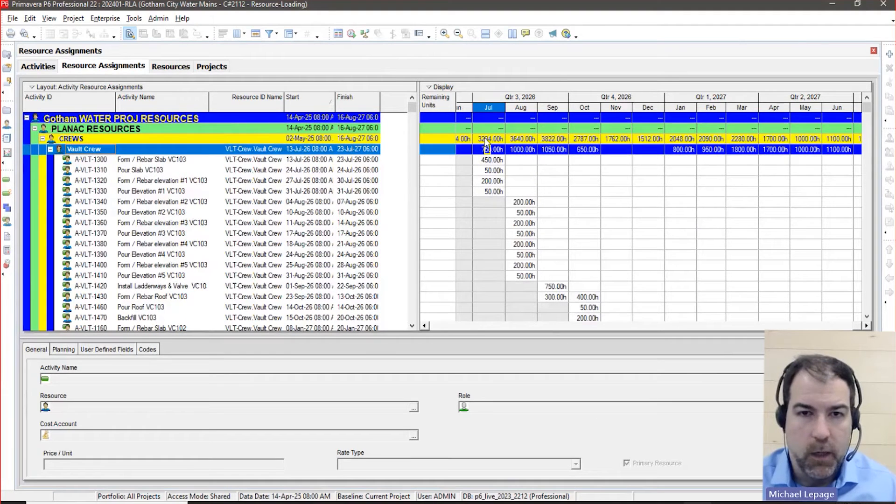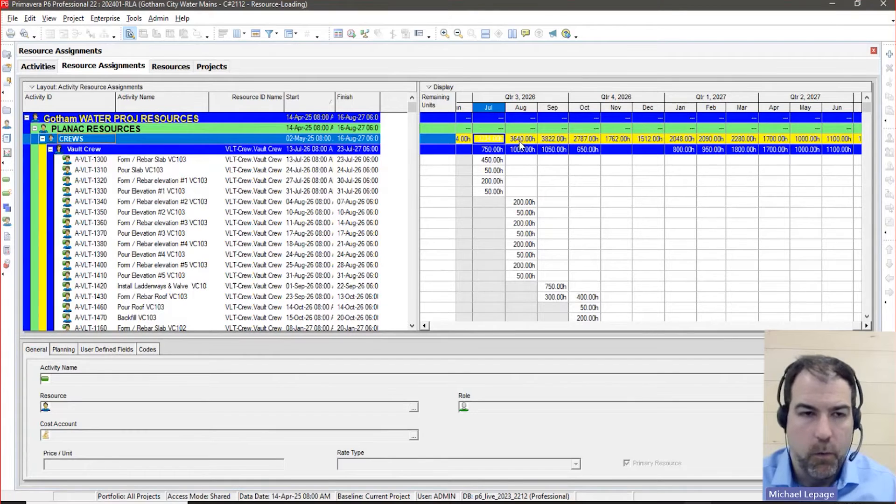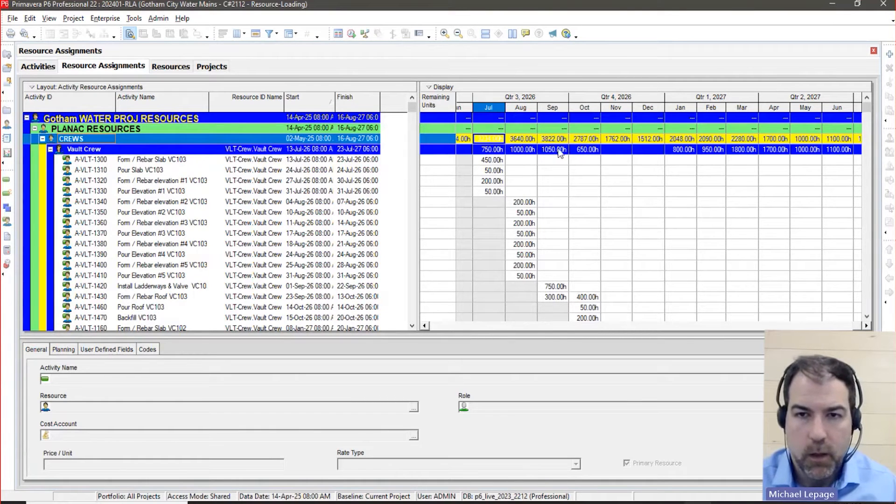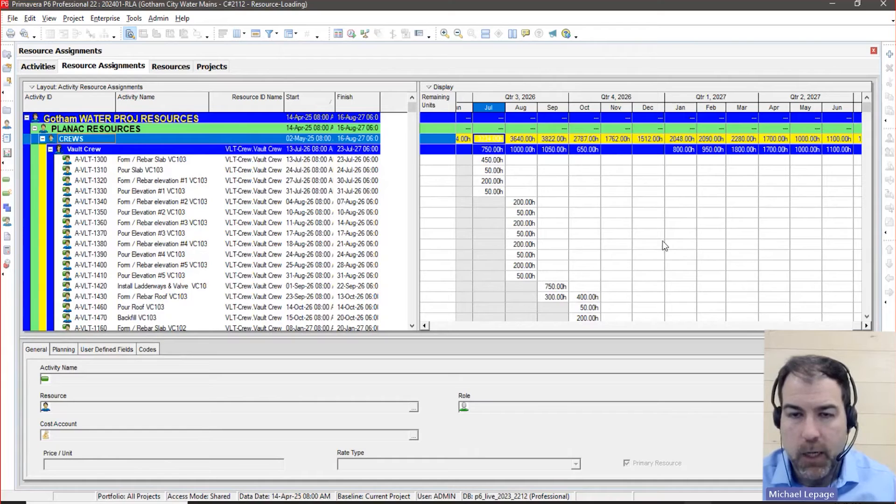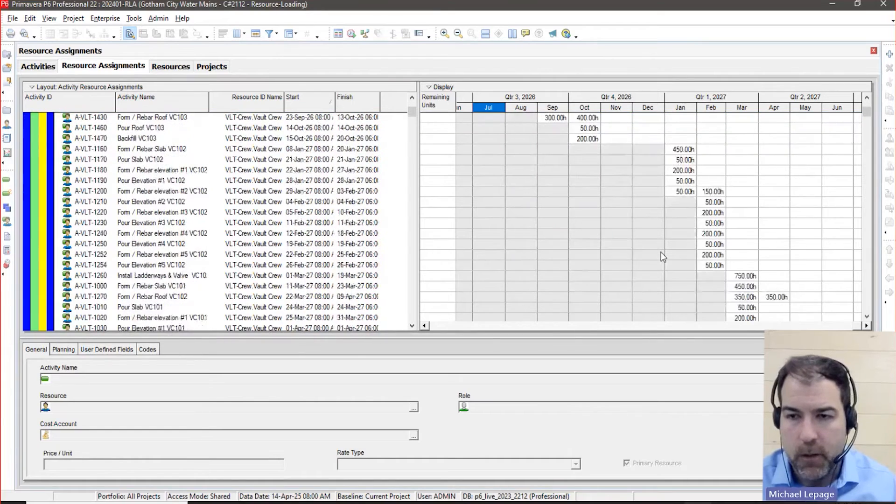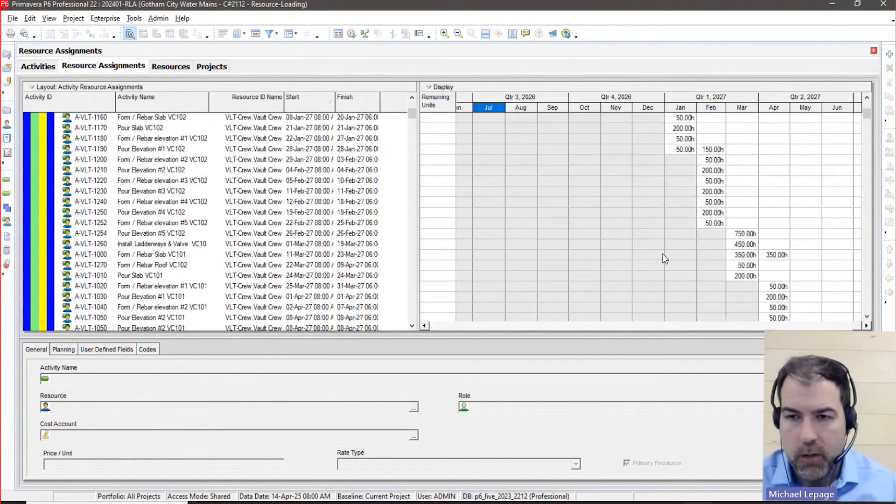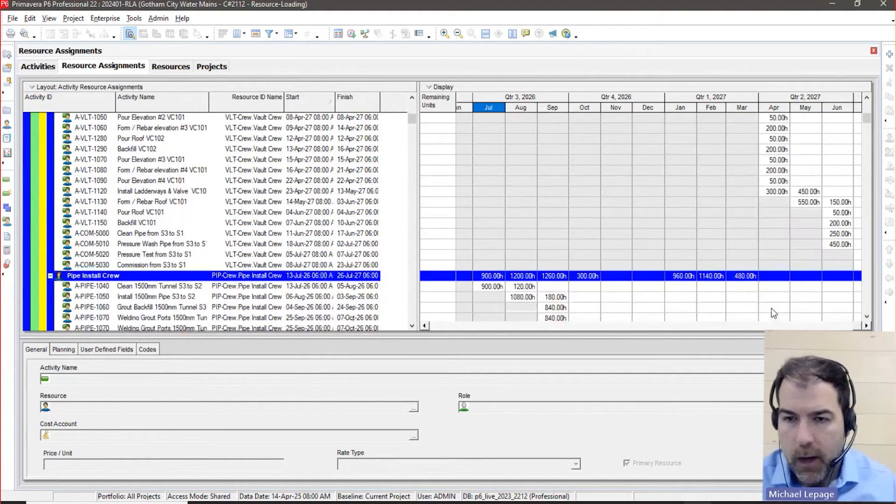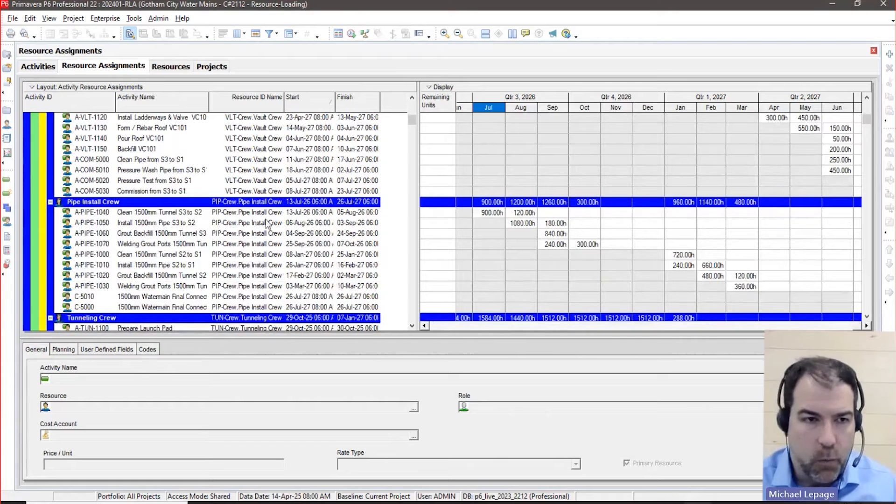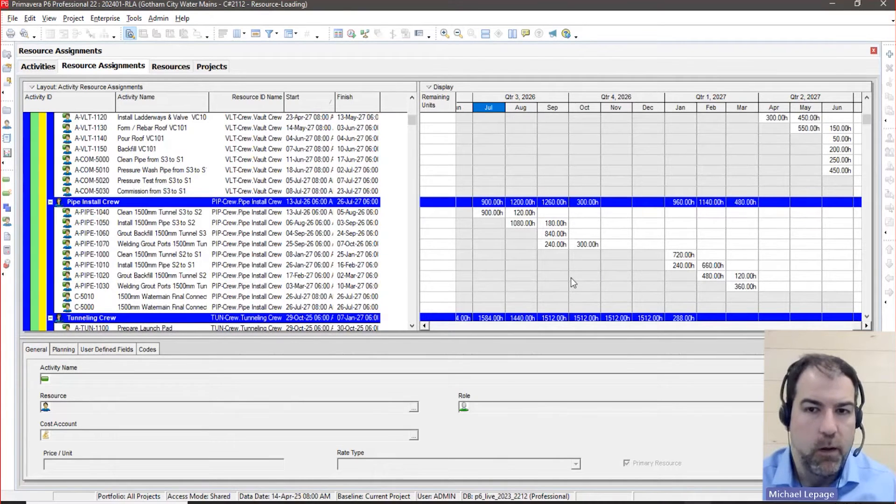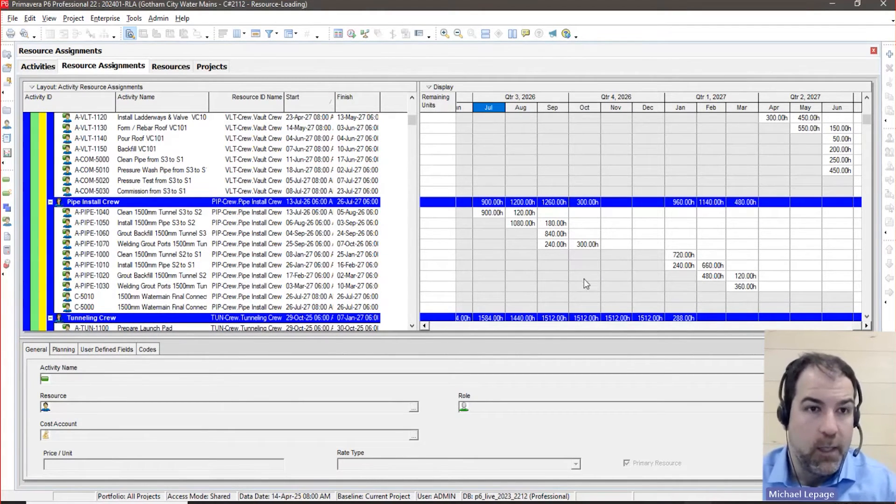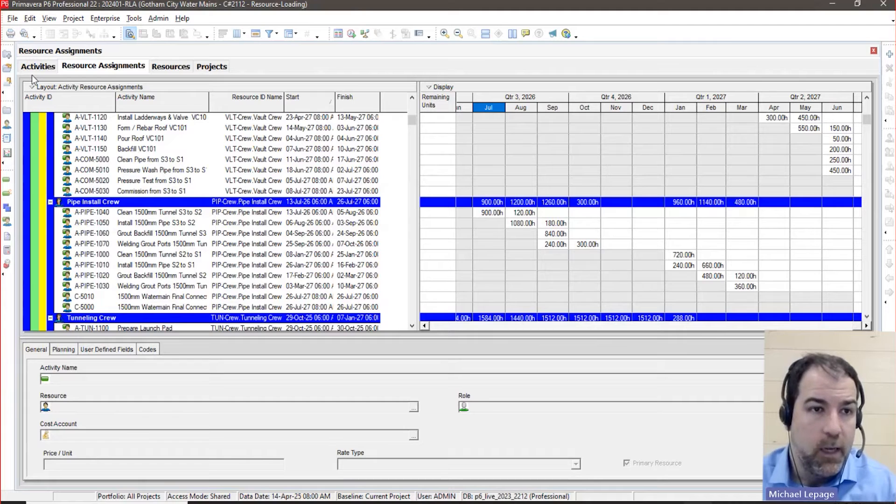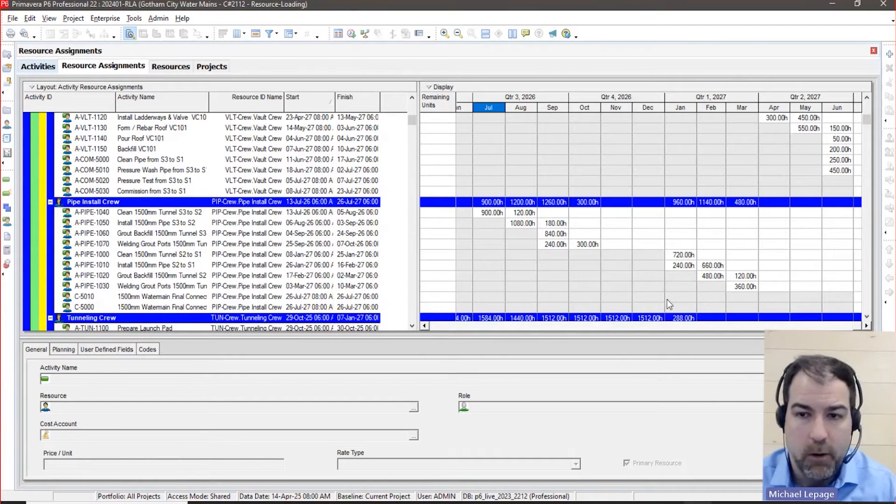So for your vault crew, what you're doing now is you're listing your crews and you're showing all the work that the crew's doing. So it's like in the other screen, you got activities with crews. In this screen, you got crews with the activities. These are the activities that they're doing. So it just kind of turns it upside down. But this is again, a really nice way to analyze your work. And so you can see, you get totals up here, right? So you can see the total work for the vault crew in August, in September, and maybe you want to take this and graph it yourself in Excel. You can do that. But again, a nice way to get the raw data. It is the same data that we're looking at in this graph, but now you're getting the numbers.